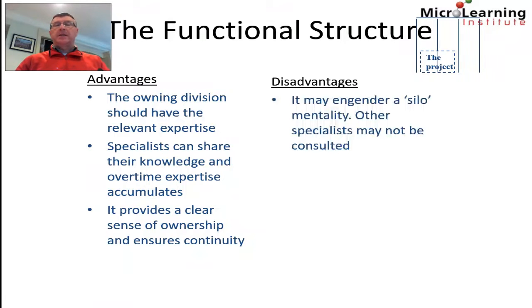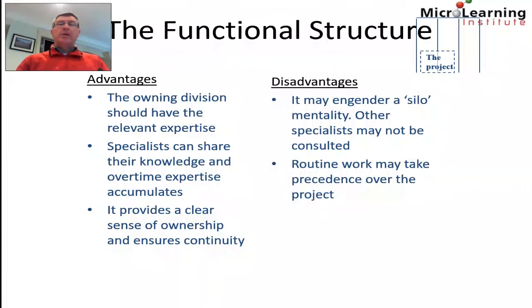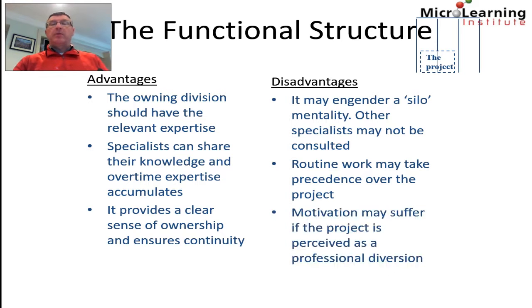The disadvantages here include that it may engender a silo mentality, that the department who have been selected to deliver the project might ignore the requirements of other departments. Other specialists may not be consulted. Also, routine work may take precedence over the project because, of course, each department is already busy with functional activities, so may not be able to allocate appropriate time for delivery of the project. And also, motivation may suffer if the project is perceived as a professional diversion.